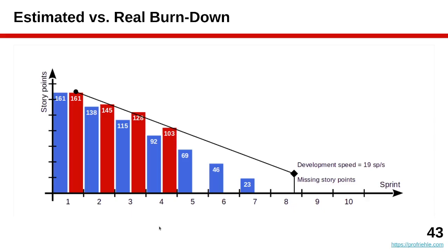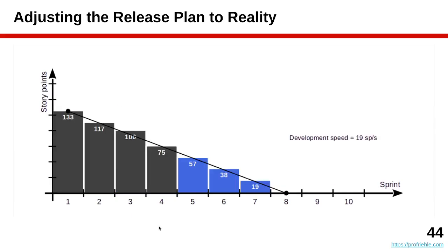So if you are now taking that to project into the future, you will see that by the end of sprint 7, you will be missing a certain amount of story points, presumably 25 story points or so. And obviously, you don't want that, and being agile means reacting to the changes in environment in a smart way. You're not ignoring that things are not working out, but rather you are accepting the reality and adjusting your plans accordingly. And that means simply lowering your expectations, because that is the realistic thing to do.